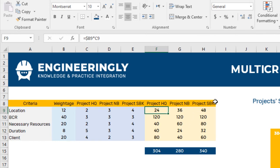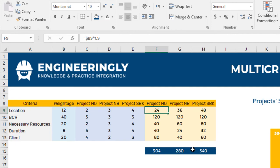As you can see, project SBK has a score of 340 which is the highest among the three options given. So as a company, one will go after this project.